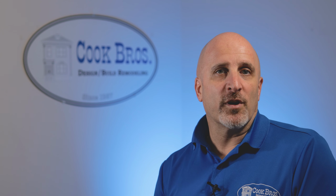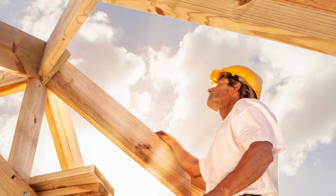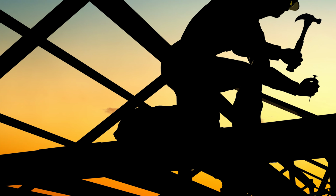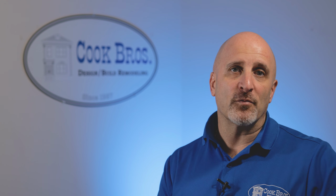Once we get your job into production, we're going to have a project manager assigned to your job, and that's going to be a Cook Brothers employee that'll be assigned your job start to finish, and won't have another project assigned to them until your job is complete. That person will be a working foreman and will coordinate all the on-site resources as we need more carpenters on site, as the trades come onto the site. That one person will be there from start to finish.